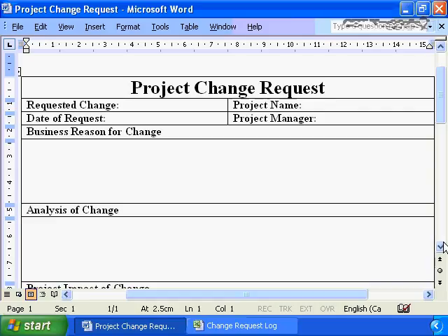If you're producing a final product, go back to our bread box example, and once the bread box has been through a prototype phase, and the business decides that 2 hinges on the bottom of the bread box isn't enough, that they need 3 hinges, that is an approved project change. Any change to any approved, and that's the key, any change to any approved component must be documented through the change management process.